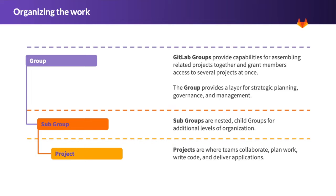To get started, let's talk about how to organize your work within GitLab. At the top level, groups allow you to assemble related projects together and nest subgroups. Groups are useful for allowing you to roll up analytics from downline projects for greater visibility, and also to define a top-level configuration for user access that's inherited by subgroups and projects.